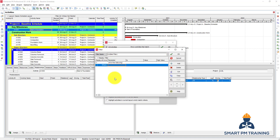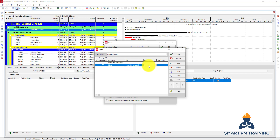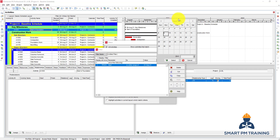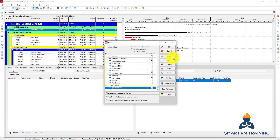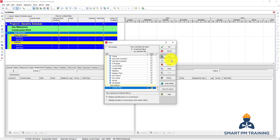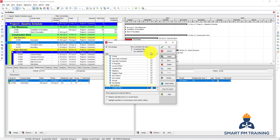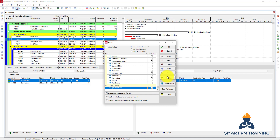Click New, and let's say I want to filter by activity start date within the range of 1st of September to 15th of September. Apply and check the results. Because 1st to 15th of September falls within the foundation work period, I don't have a specific activity with a start date in that range — during this period from 26th of August until 23rd of September, I am doing foundation work. So let's set another filter.